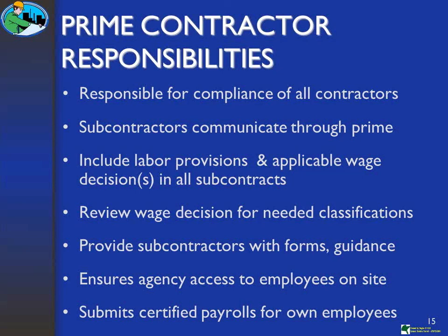Ensure the agency's access to employees on site. We touched upon this in the other session, whereby the contractor, the prime, should be informing his or her subs that somebody from the Department of Labor may come by. Somebody from your agency may come by. Somebody from HUD may come out to conduct an employee interview, and you should allow the employee to have access to that person, whoever it might be. It's totally voluntary, but they should have the choice to participate or not.